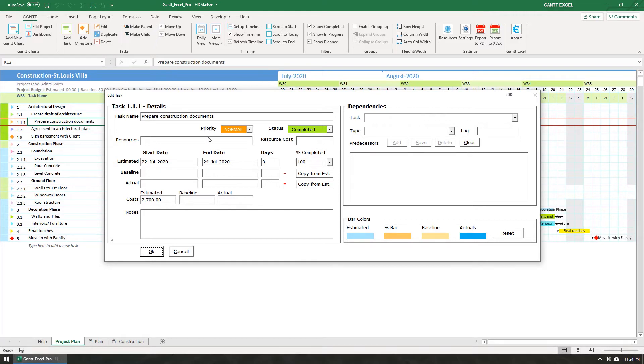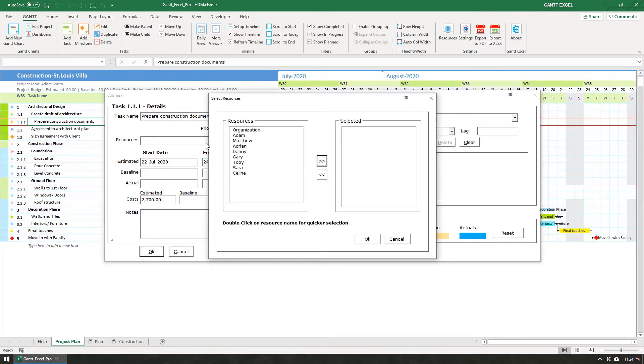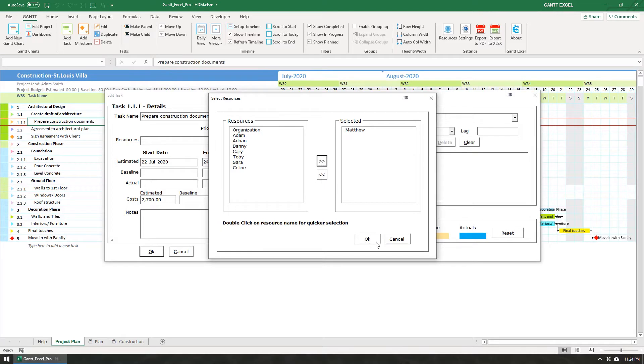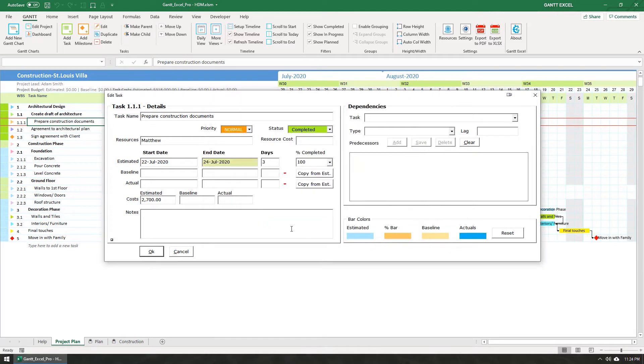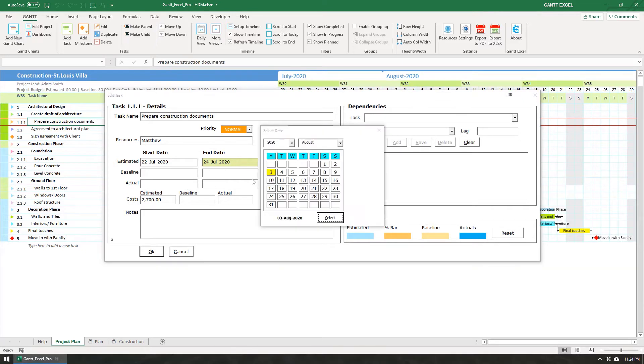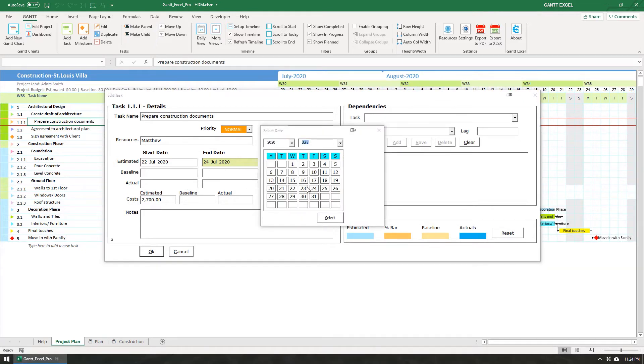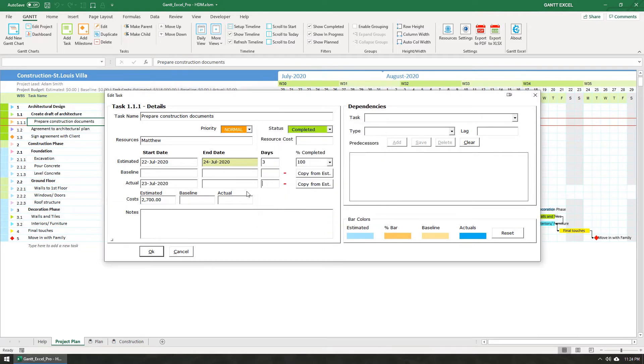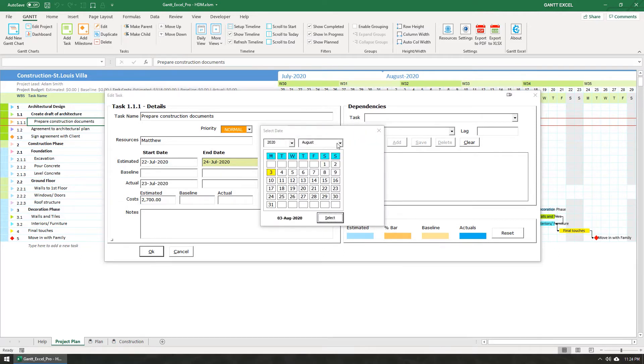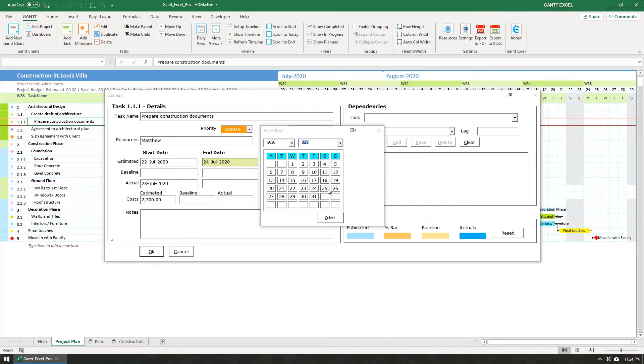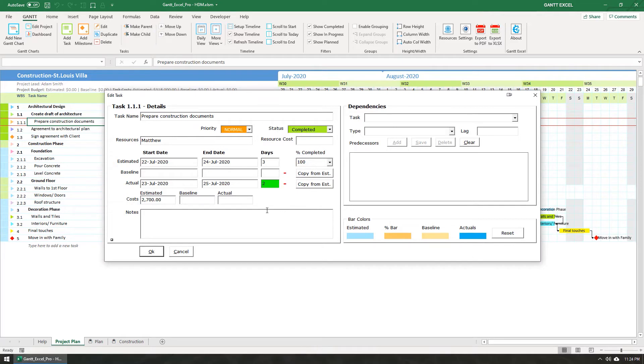Let's make a few changes. Click on the Resources field and the Select Resource form will open up. I will assign this task to Matthew. Since this task is marked 100%, which means it is completed, I will set the actual start date and actual end date as well. I will update the actual costs to $3,500.